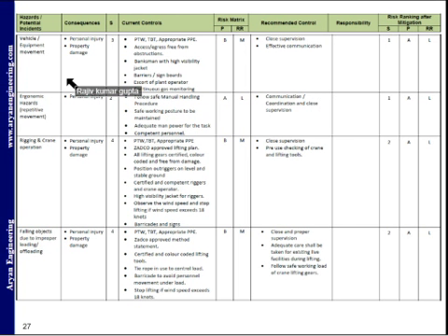Now you can see how we will, Apurva, you asked me how we will identify the risk. So there is an RBS, a hierarchy where we have the technical or organizational categories, and it is again subdivided into our hierarchy to identify the risk. I took one example, like vehicle equipment movements.